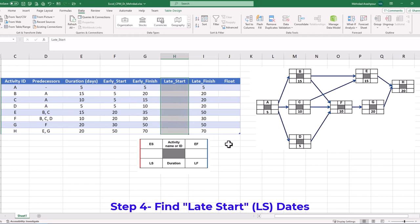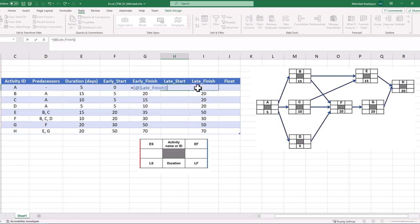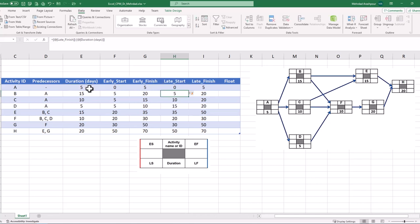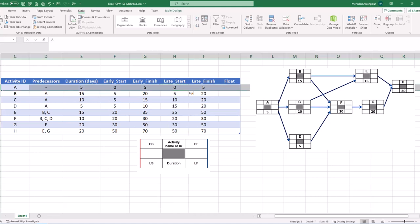Step 4 is to find the late start dates in Excel. Click on the cell related to activity A, press the equal sign, and select the late finish cell. After that, press the minus sign and select the duration cell and press Enter. You can see that late start dates are calculated for all project activities. This concludes the last step in solving our project's critical path in Excel.